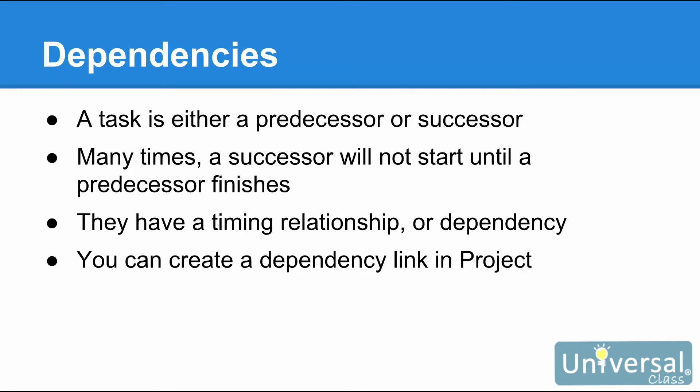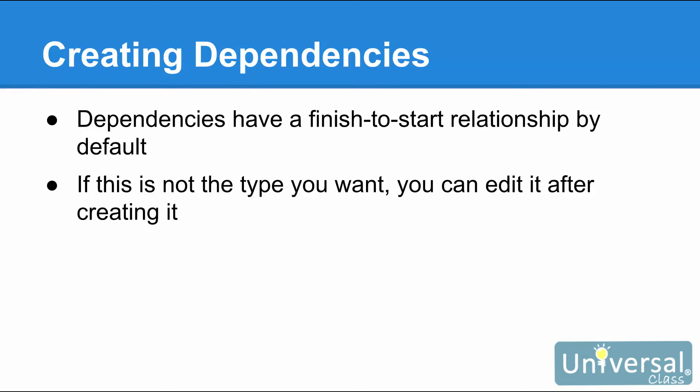In Project 2016, you create a dependency link. This link will cause a task to either occur before or after another task, or to begin or end during the duration of another task — in other words, it gives them a timing relationship. Whenever you create a dependency, it is a finish-to-start relationship by default. This means one task must finish before another begins.